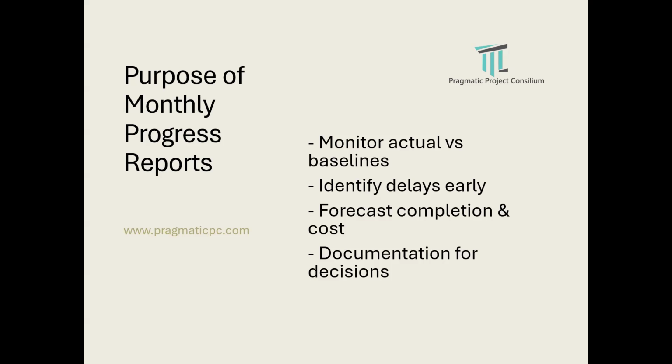See, progress reports have updated schedules, but that doesn't make it eligible for EOT. It is a monitoring schedule. It gets updated based on the actual baseline, but unless it is agreed by both the parties, it never becomes an EOT.